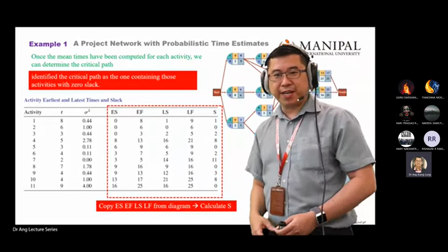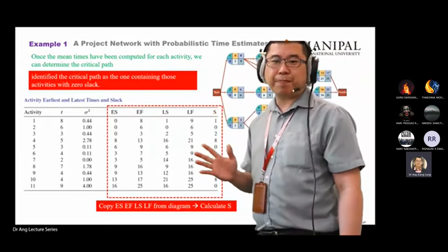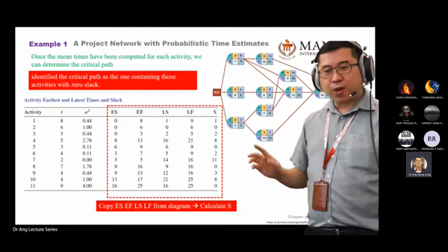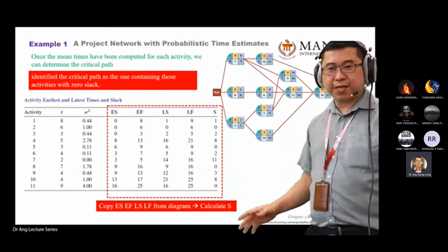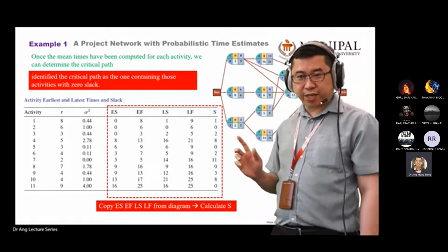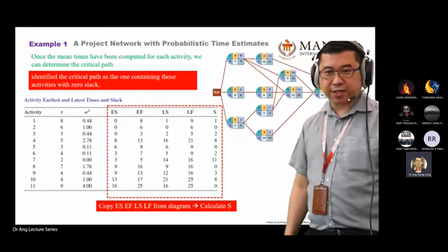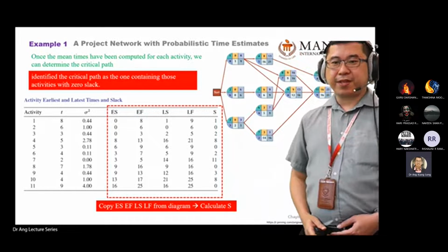Okay, a bit. So there's only one purpose we have this table, which is to find the slack time. Why do we find the slack time? Because we can identify the critical activity or critical path activity. Okay, all right. Thanks, Sarini.